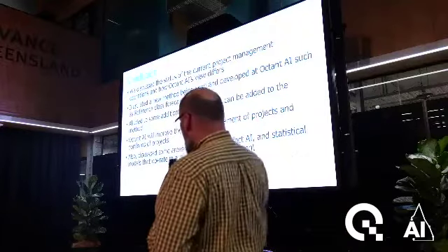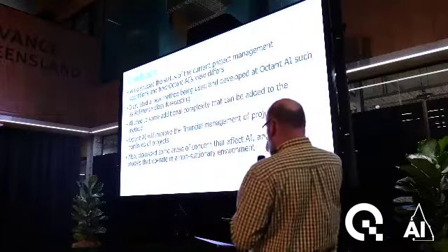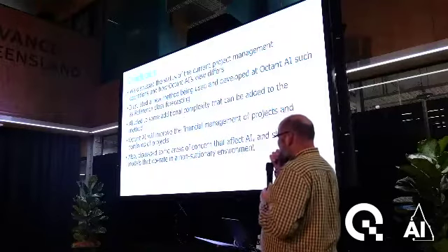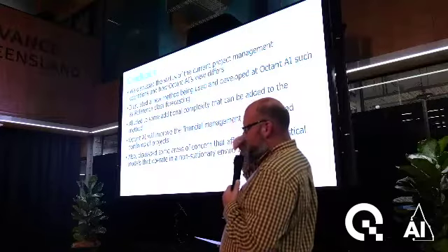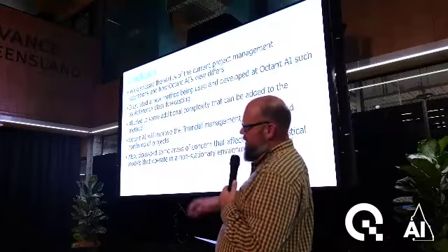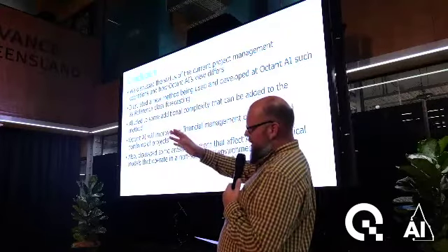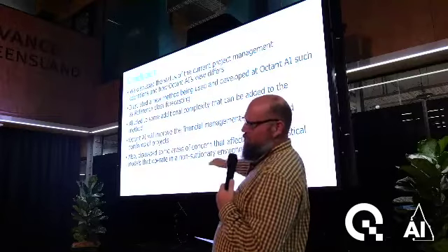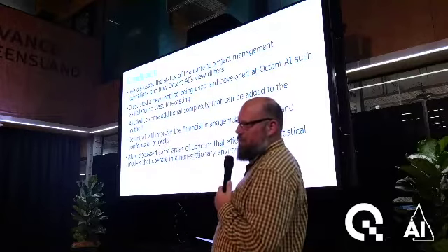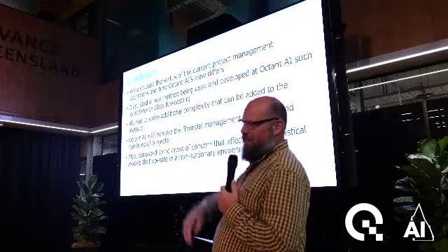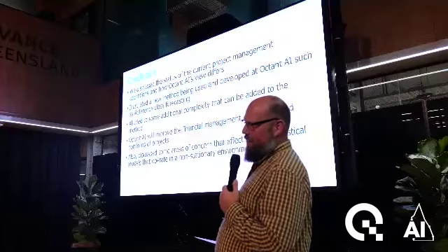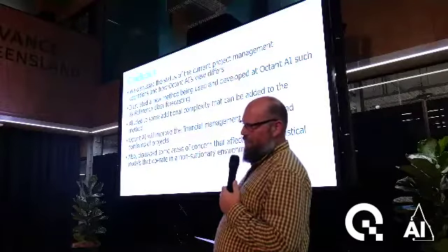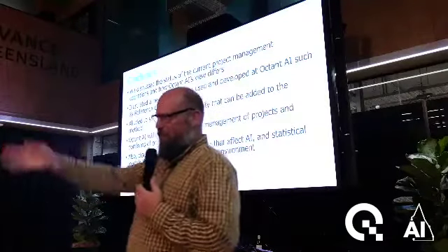But the thing about the IT projects, you can apply what we're doing to IT projects, but what you find with IT projects in their reference classes is that they blow out much more. They're much longer tails, they're much worse. And so our CEO, Dave Porter, always says, if you're building a bridge or a house, there's only so much concrete you can pour, but you can just keep people churning through and writing code forever.